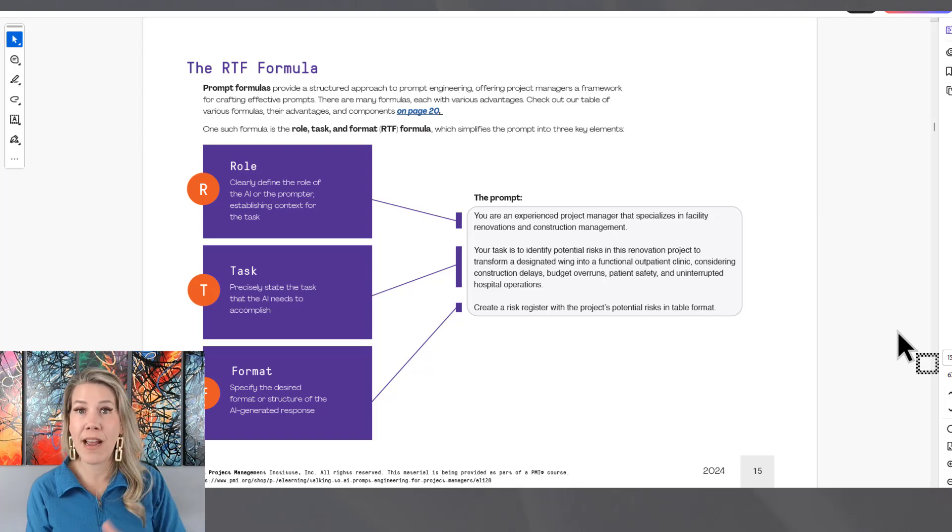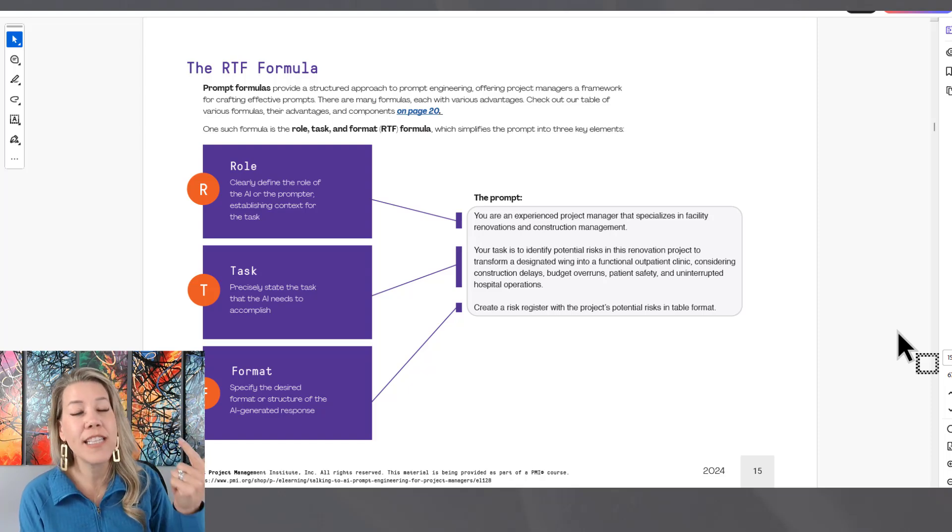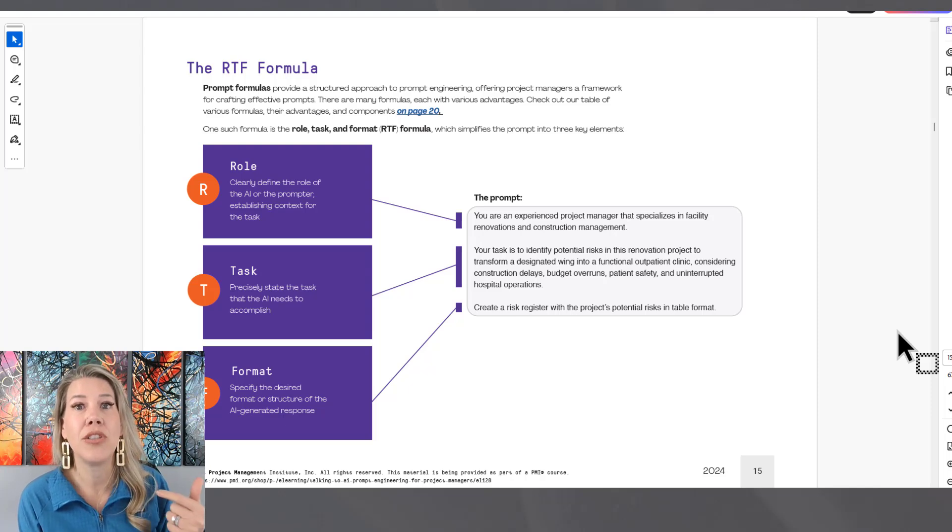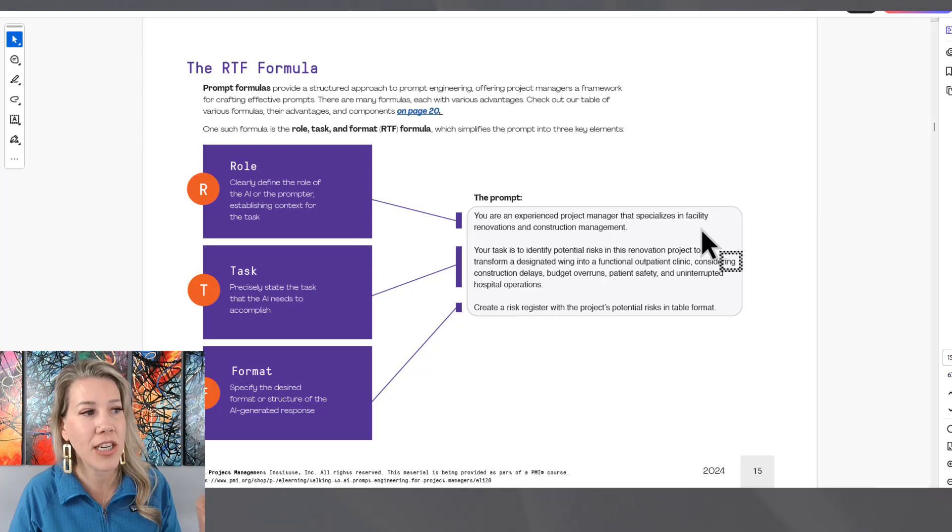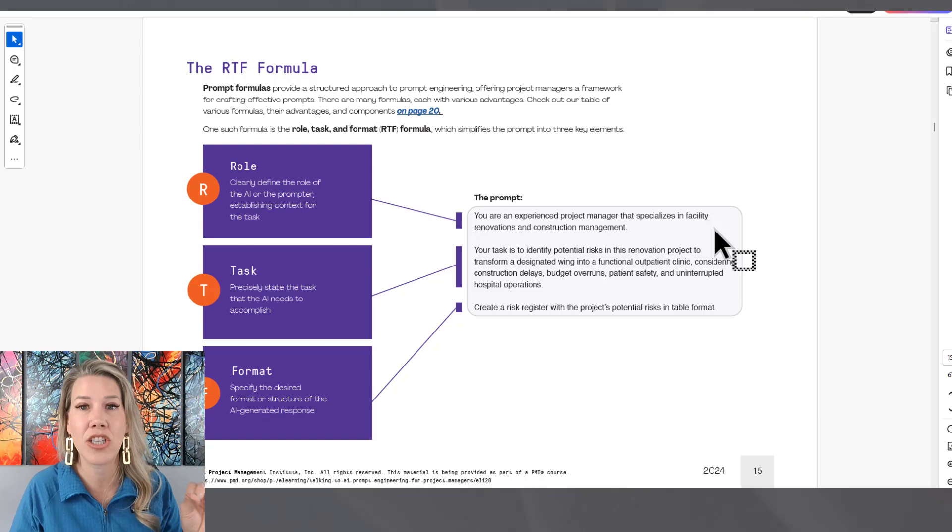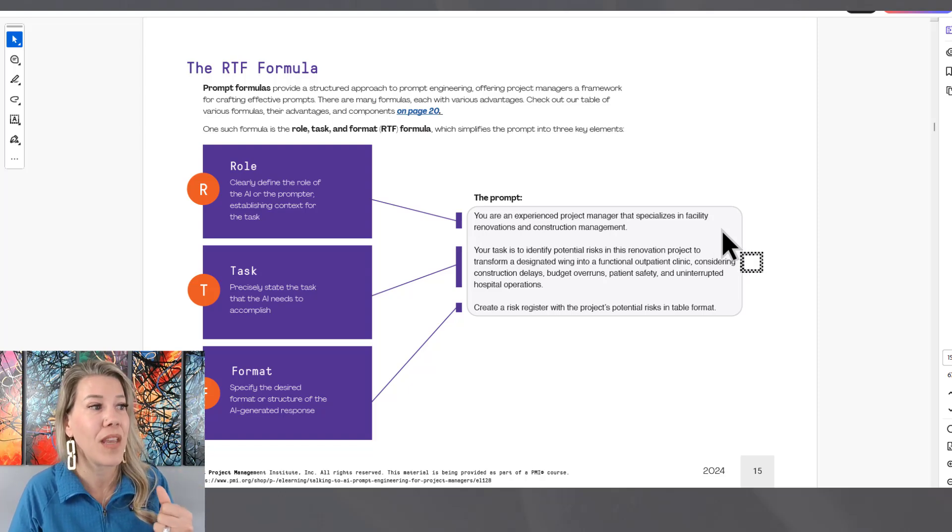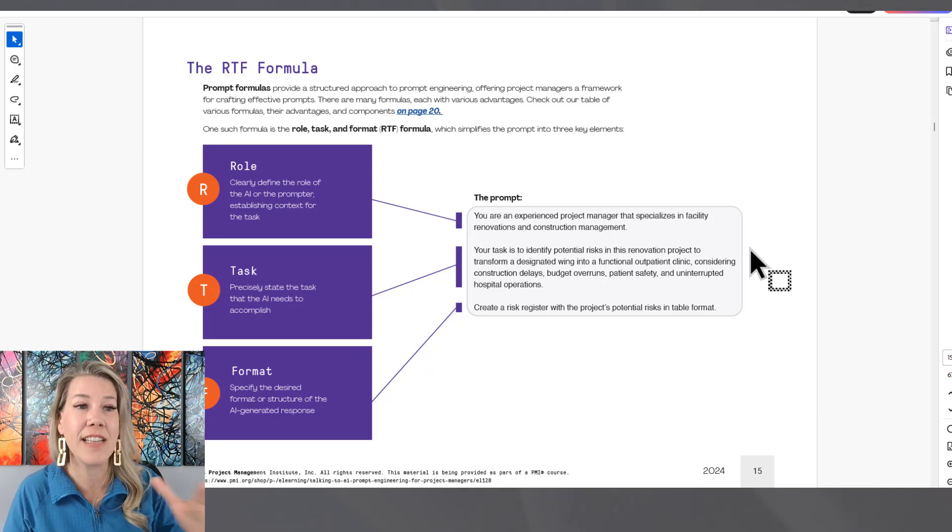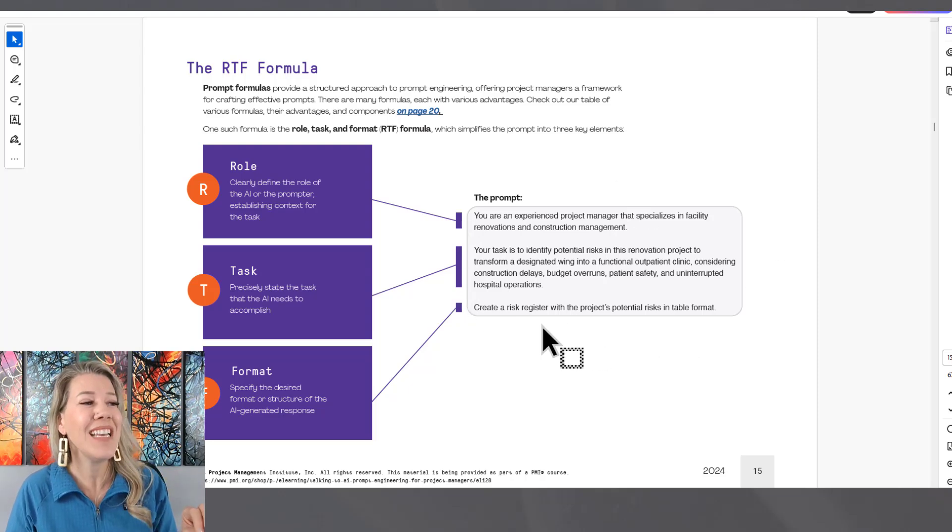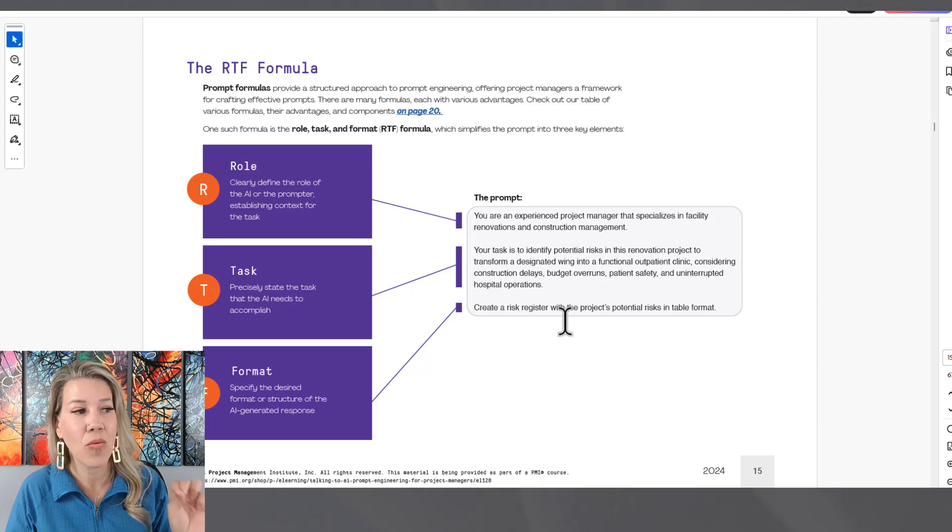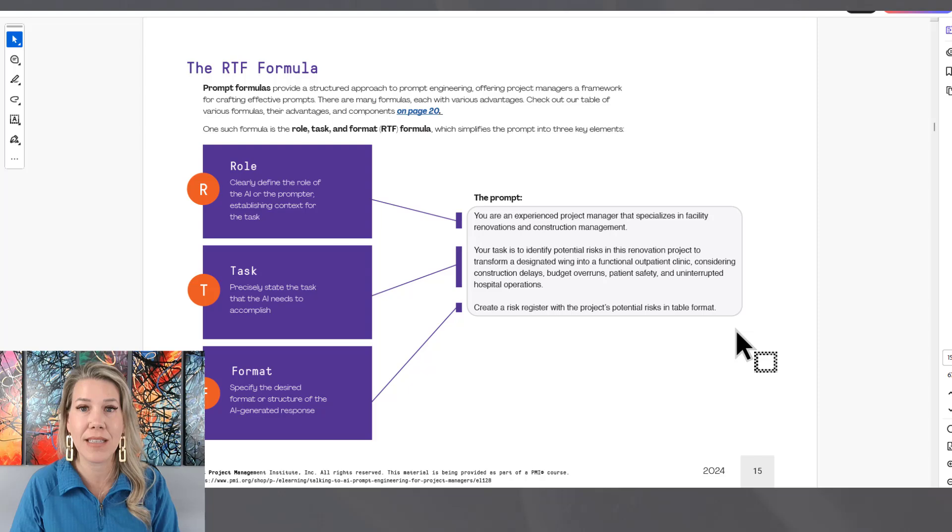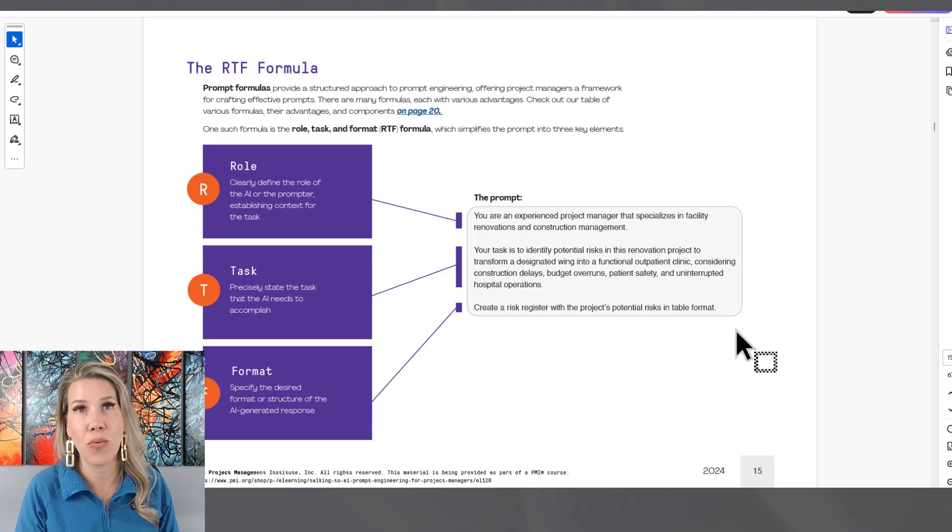So RTF formula: the role, the very specific task that you're asking the generative AI tool to really focus on, and then the format. So this is a great example here. You are an experienced project manager that specializes in facility renovations and construction management. So it's got the role and some additional context there. Your task is to identify potential risk in this renovation project. And then create a risk register with the project's potential risk in table format. So this is a great formula to start with when we're talking about how to prompt generative AI.